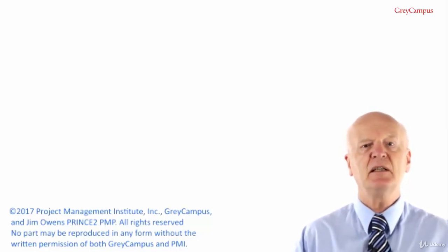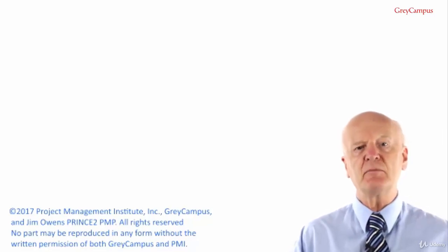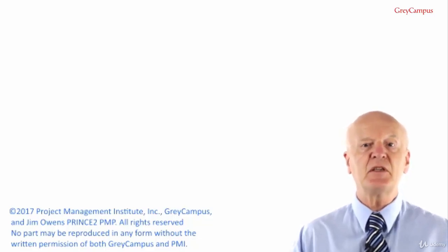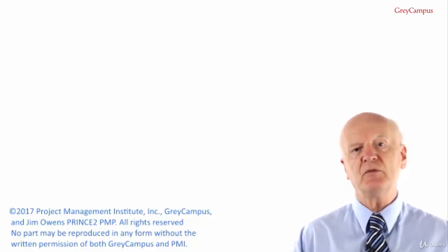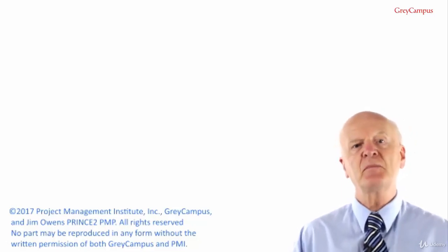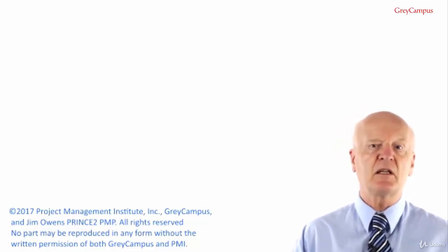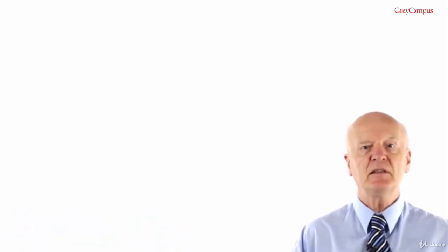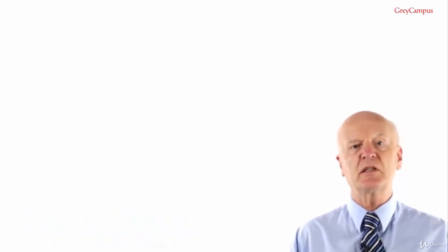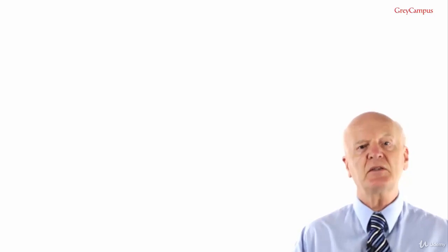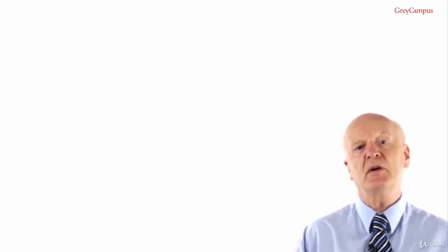The activities necessary for the administrative closure of the project or phase include actions and activities necessary to satisfy completion or exit criteria for the phase or project, such as making certain that all documents and deliverables are up to date and all issues are resolved, confirming the delivery and formal acceptance of the deliverables by the customer, ensuring that all costs are charged to the project, closing project accounts, reassigning personnel.